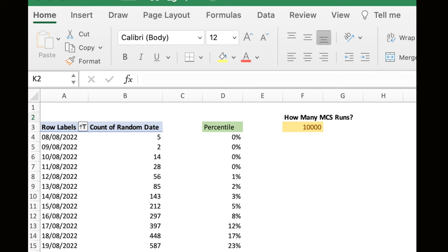What you'll almost certainly discover when you calculate cycle time and Monte Carlo forecasts is that they aren't good enough — and even if they are, you need to actively manage the process. The first action is limiting your work in progress: simply reduce the number of items in progress at any one time by putting a limit on your in progress column. The number depends on team size and makeup — to start, choose based on how many developers you have, so if you've got three devs put a limit of three, run this for a few weeks, then inspect and adapt. If a team member would break the WIP limit by starting something new, they should help others complete their work first. This increases collaboration, communication and knowledge — stop starting, start finishing. By limiting your WIP you will get more done faster.